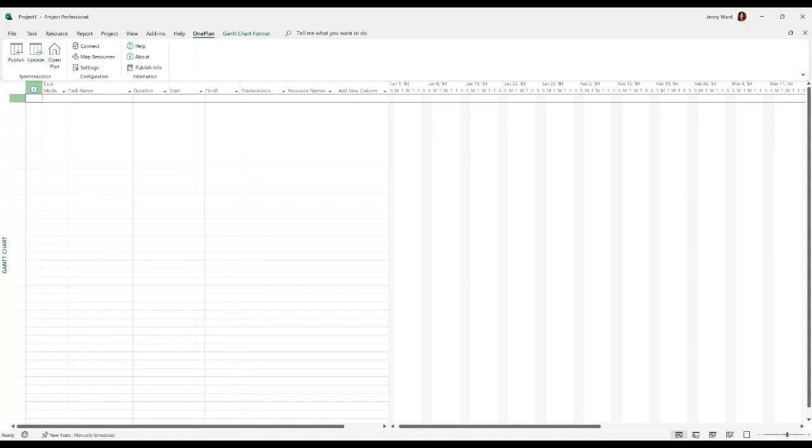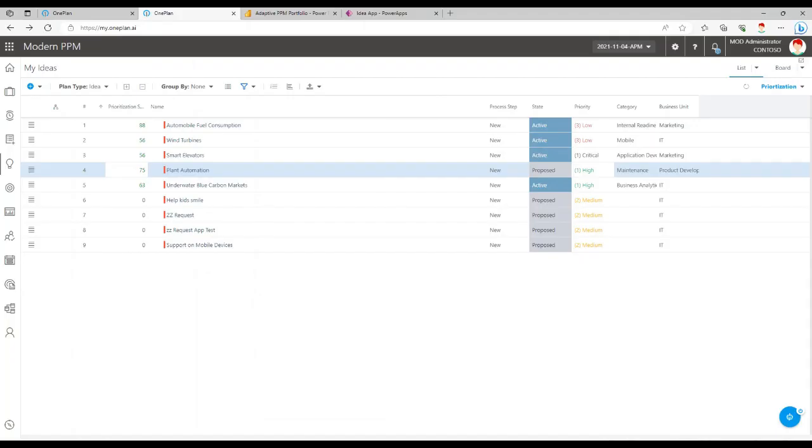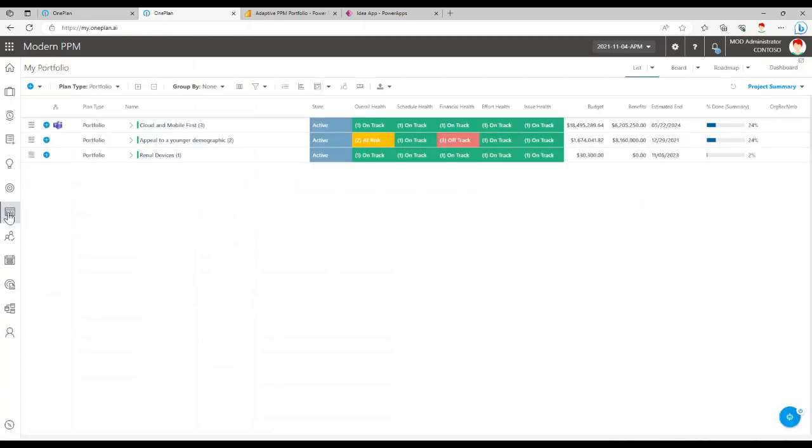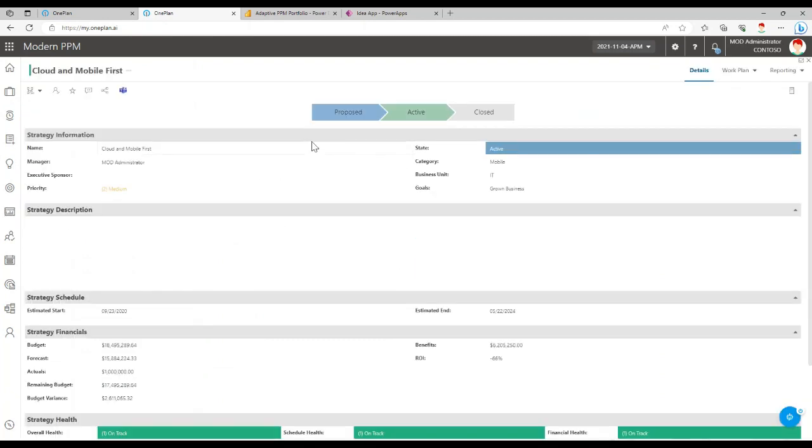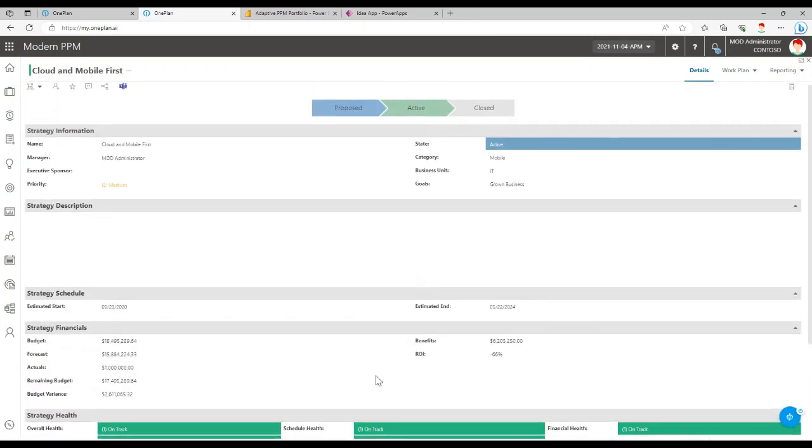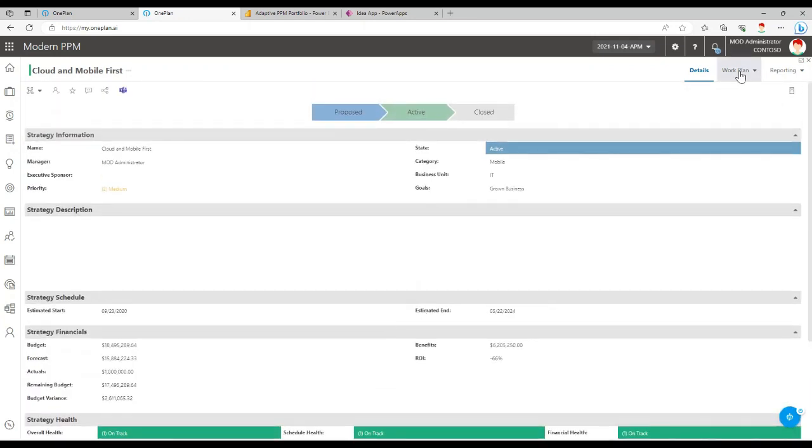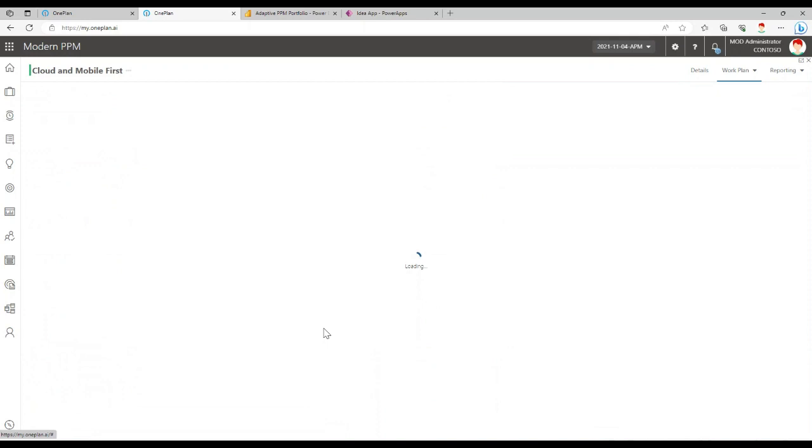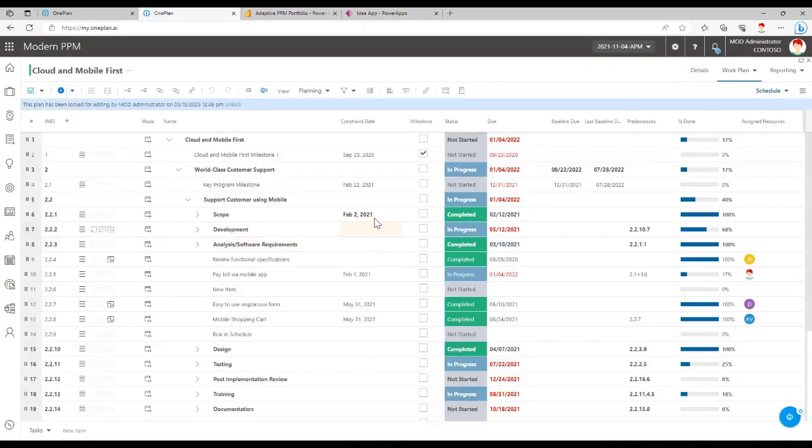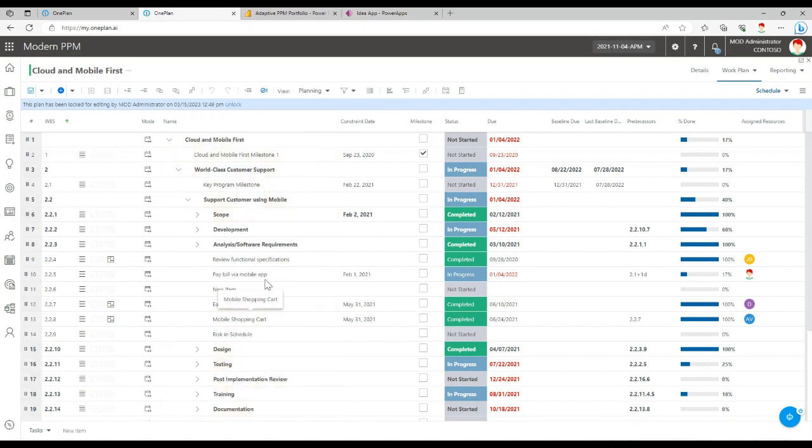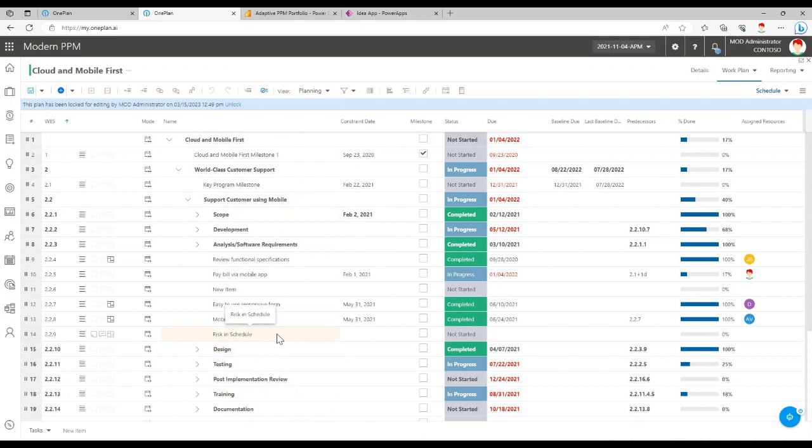And then you can publish the project from here to an already existing record in OnePlan. This will still allow you to manage the plan level fields here. If I go back into here, into the portfolio, I go into that cloud and mobile first, you can still manage all of these fields here. But then when you're in the work plan list, this would show that it is connected to project professional, and this would be locked. This can be used both as a continuing management of the schedule in OnePlan and project pro, or you can just use this as a mechanism to import projects into OnePlan that already exist. Then you can disconnect from project pro and just work only in OnePlan. You have many options when it comes to those integrations and connections.